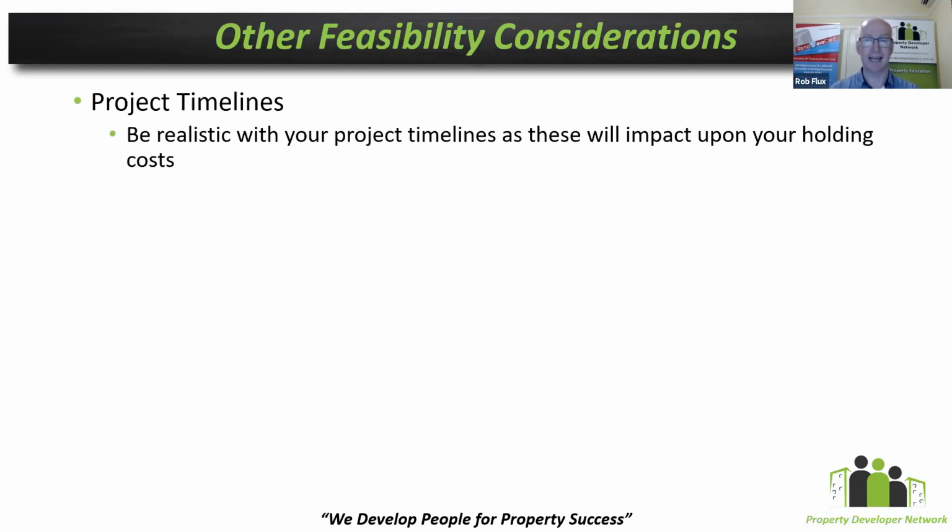So understanding just your development approval timeline is critical, let alone then I've got to actually go and construct it and then go and sell it at the tail end. If you don't understand those elements, that's really going to blow out your holding costs. So critical that you get that right.